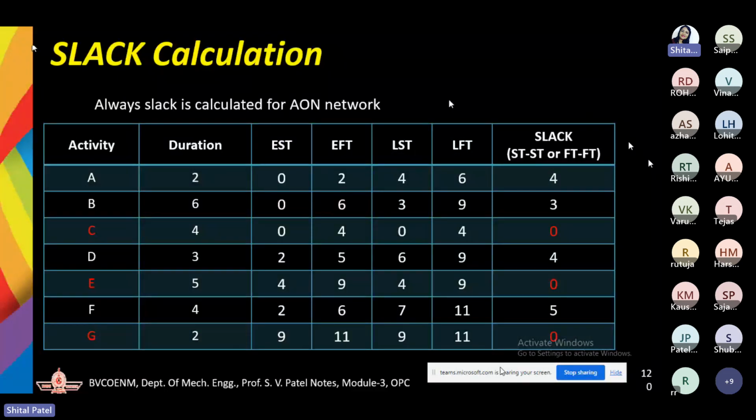Take an example, if I want to construct a building, then I know that this many resources are going to be required, and by this many days I'm going to complete the construction of the building, right? So here we can implement the CPM method because we know tentatively that this particular activity is going to consume this many days, because previously we had experience with another building.